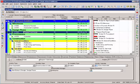If you're just building a schedule for construction, down in the details area, you'll want to keep fixed duration and units. This is the most common used duration type.